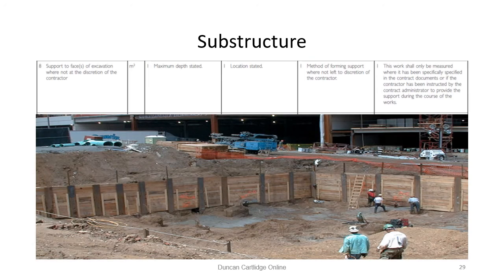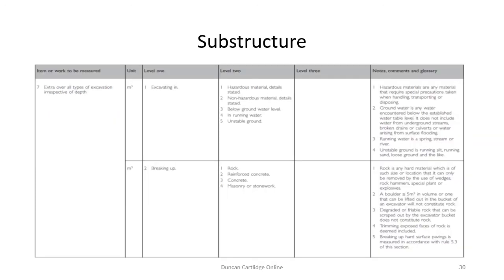Before we leave Groundworks, let's have a look at a couple of items. The first is support to the faces of excavation. This item is not generally measured and the contractor or subcontractor must make their own allowances in their pricing to cover the cost. The only time earthwork support is measured is when the contractor is instructed specifically to include it.